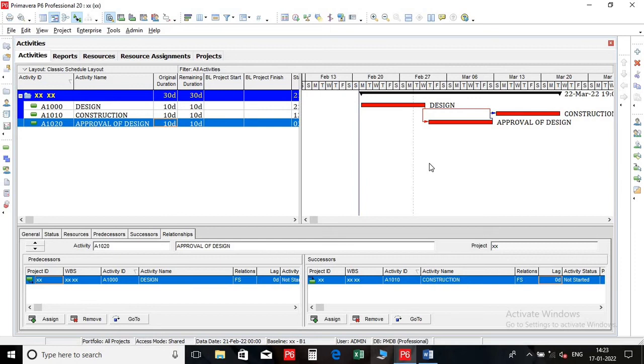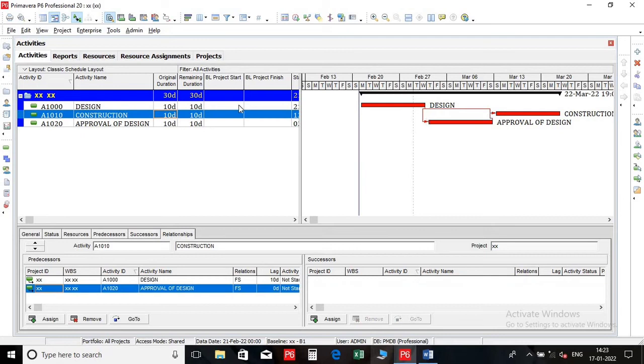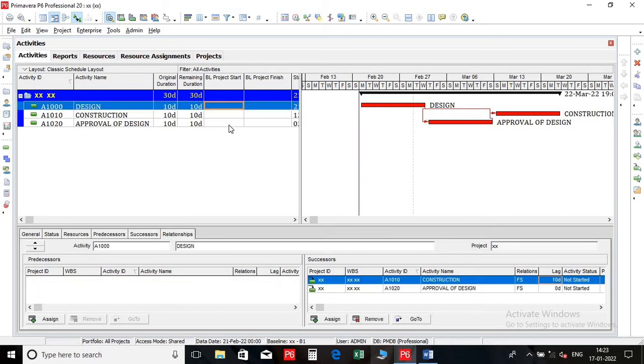What we implement by lags is usually a more complicated and dynamic entity which should be treated as an activity. I don't know if you are going to accept the DCMA rule or not, but if you don't, I suggest that you should keep a limit for your lags.